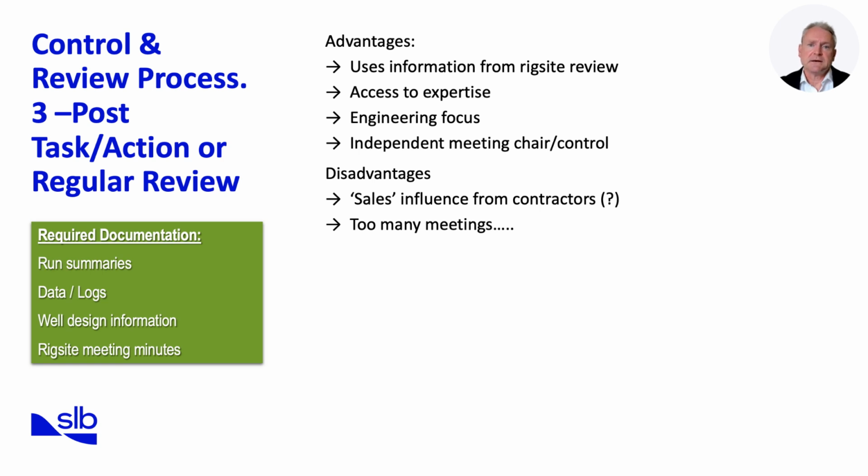However, challenges remain. Contractor sales influence can creep in, shaping perceptions, and there is always the risk of review fatigue if too many meetings are scheduled. Required documentation includes run summaries, operational logs, well design information, and importantly, rig site meeting minutes. Together, these records provide a complete chain of evidence for performance evaluation. In effect, the post-task or regular review forms the bridge between operational detail and engineering improvement. By taking rig site insights and validating them through technical review, the findings become robust enough to update designs and influence future programs. This leads us naturally into the next stage, post-operation control.